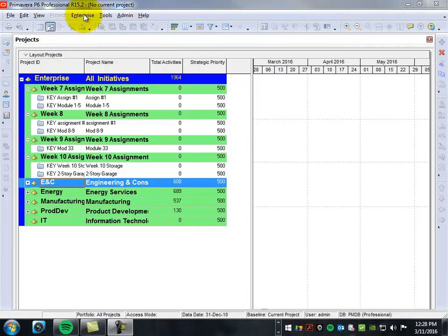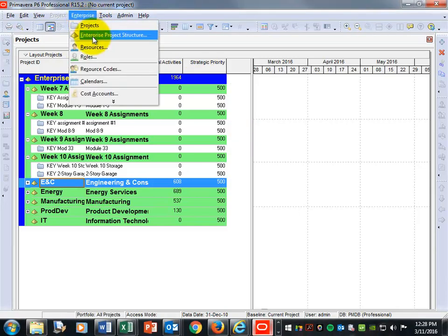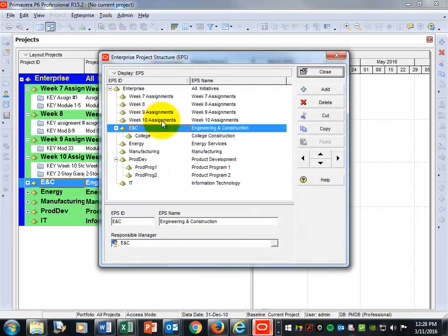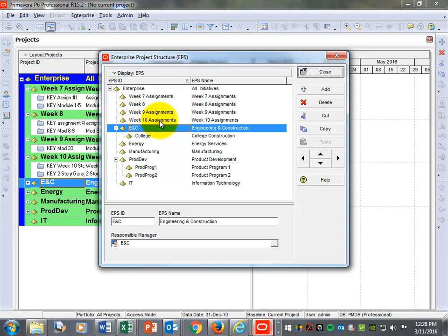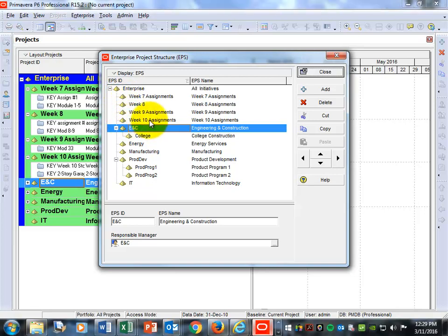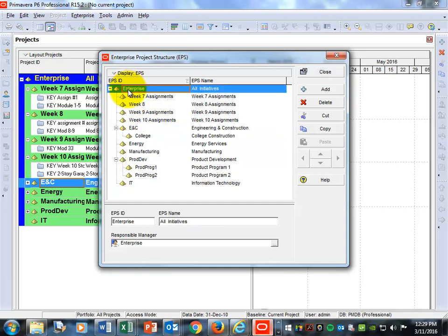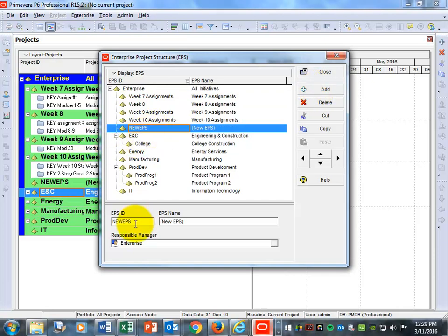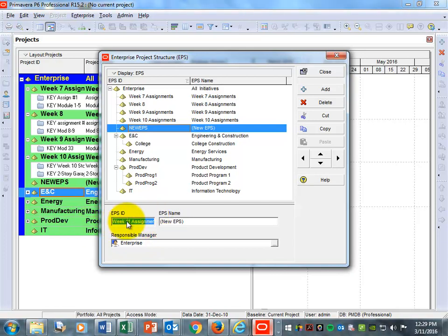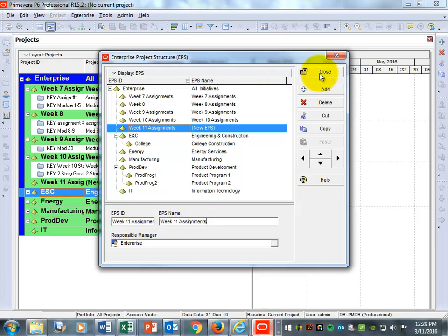Basically what you're going to do is come up to Enterprise and go to Enterprise Project Structure. I create a different enterprise for every week's activities — it just makes it easier to organize. So click on Enterprise, come over to the right and hit Add. I'm going to type 'Week 11 Assignments' and copy and paste that for the EPS name as well. Then hit Close.